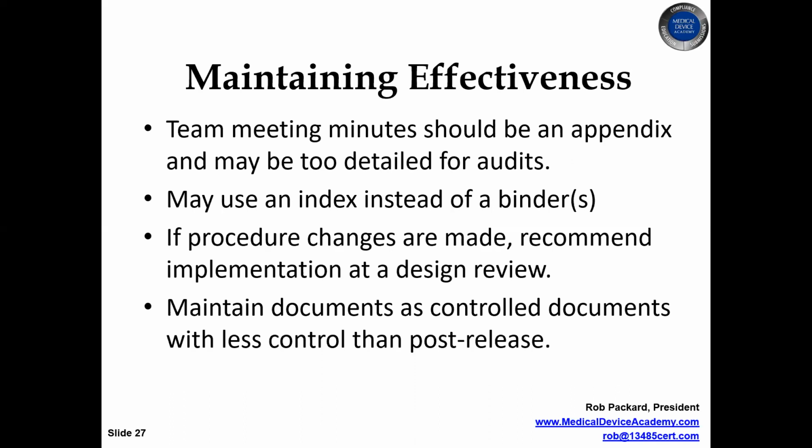Now, once you get to the point where you're at design freeze, it's going to get expensive. Once you get to the point where you're doing clinical studies, now it actually could risk patient health and safety. So I would have one level of control after design freeze, and that would be very tight. And a whole another level, if we're going to do a clinical study, probably I would just use the same exact controls that I would have for a product that's actually already approved and on the market.